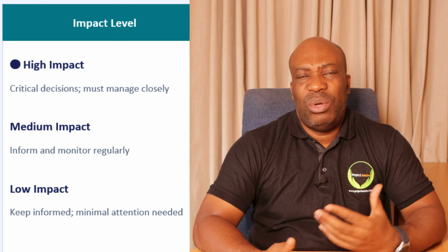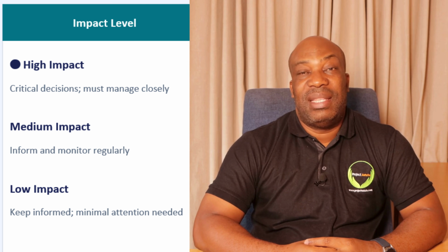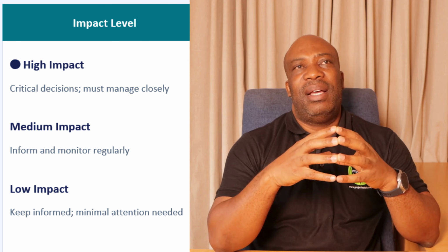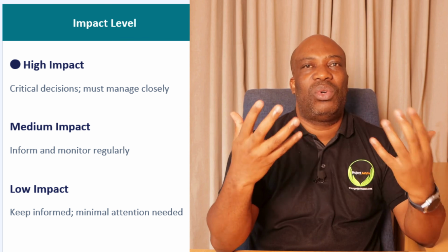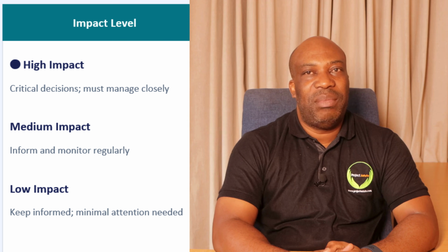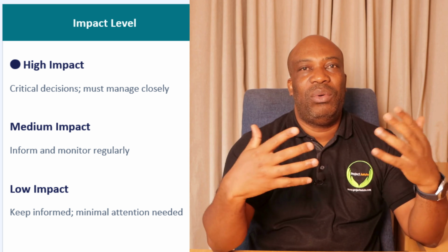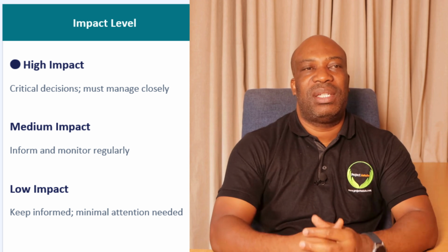Assuming you are outsourcing some specific tasks to vendors or other suppliers, and if they don't deliver a certain component, as an example, you are unlikely to succeed or to complete the project. So that's a high impact stakeholder that has to be managed. If you don't manage them properly, you won't be able to progress. And they normally treat you like any other customer. It's not like to them it's a project.